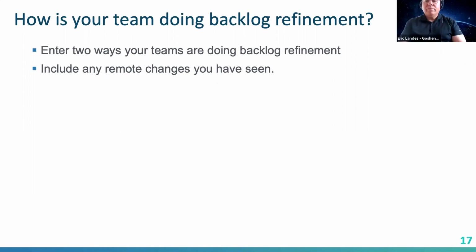Yep. Understood. And the why for the sizing as a team is typically to resolve any misunderstandings. So if the developer, let's say, sizes something into a large or 13 if using story points or whatever the case might be, and the product owner was thinking that it was smaller, it's a chance to figure out what that discrepancy might be. So that's one of the benefits, the whys in having everybody do it together, even though it does take longer, perhaps.